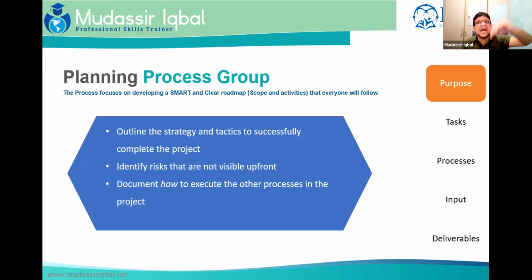initiating are just on a higher level. That is more like if the government changes the rule. The risks that you will be covering in the project charter are more like: if the funding will stop, if the market will change, and if the laws will change, then what? So in initiating, risks are more towards the overall project level, that the project can be stopped. But once you go into the planning, you need to say that while doing the task of painting the exterior of the building between June 15th and June 25th, there are chances of rains, and that might put this task at risk.